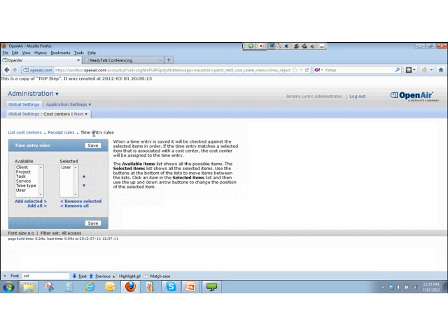But what if you're in a model where it's, well, it follows the user unless it's a subcontractor, and the subcontractor in that case, maybe it follows the project or something. In those cases, you could set it up where you say, I'm going to pull it from the user unless the user's field is blank, because a contractor could be shared across different organizational cost centers. So a contractor may have a blank cost center value, and then since the user field is blank, it would then look at the project to pick up the cost center,